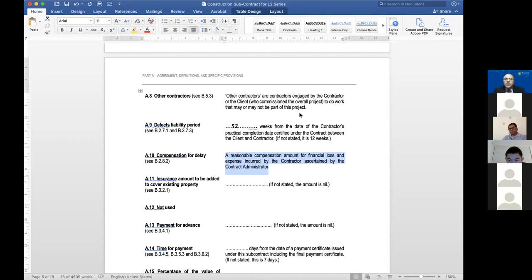How much do you think the main contractor should recover from the cauldron subcontractor? I don't care what his or her subcontract sum is. It's irrelevant. Why? Because the definition of liquidated damage is not tied to the subcontract sum at all. It is tied to what is a genuine pre-estimate of the likely loss. In this case, given that this is the sole reason for the delay and the sole activity which has caused the delay, it would be 1 million.